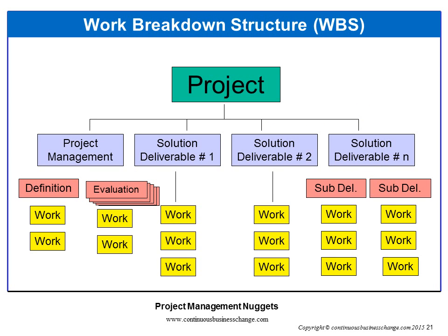Every project needs a work breakdown structure. We strongly recommend facilitating your core team in creating the initial WBS with Post-it notes before putting it into any software. The WBS is a picture of your project. The deliverables or nouns that are large can be broken down into subdeliverables, which are also nouns. Not all deliverables need to be broken down into subdeliverables.